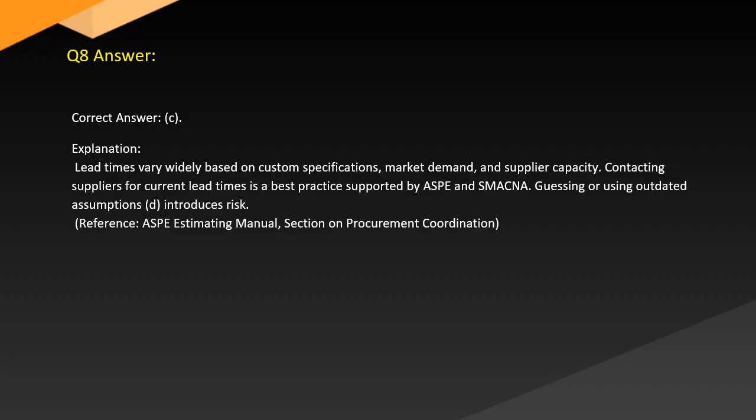Answer. Correct answer: C. Explanation. Lead times vary widely based on custom specifications, market demand, and supplier capacity. Contacting suppliers for current lead times is a best practice supported by Aspen SMACNA. Guessing or using outdated assumptions, D, introduces risk. Reference: ASP Estimating Manual section on procurement coordination.